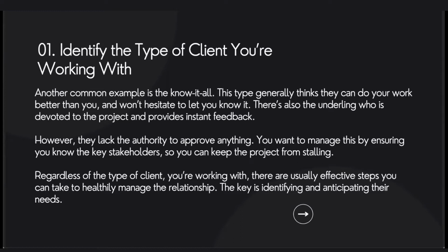because there's a process for everything that we do. A simple example is they're managing a website project for their boss, and you're in Basecamp with the project manager that we assigned to you. We provide the first draft, first revision, second revision, and the final. Those are the different stages we take a client through for web design. They always have those revisions. And then at the final revision, this person doesn't know that this is the final and that's it, and any edits after the final, we'll have to provide a quote for.